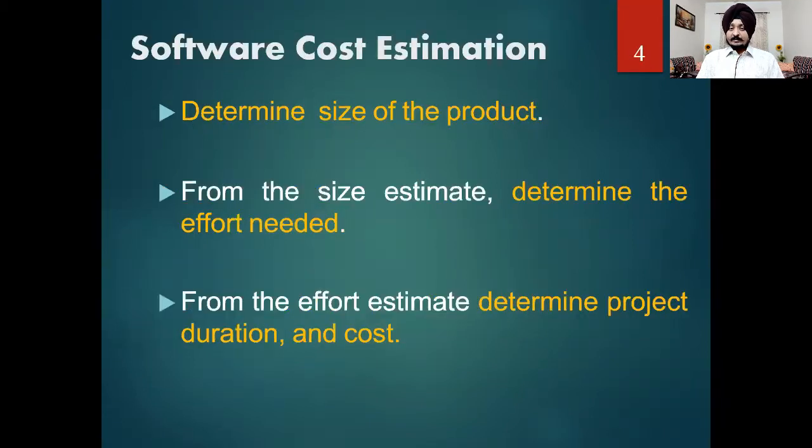Now come to software cost estimation. This is very important as far as software is concerned because it will determine the overall size of the product, and from the size of the product we can determine its effort, how much effort is required to complete this software. And finally, if effort is known, we can determine the cost which is required to develop particular software.